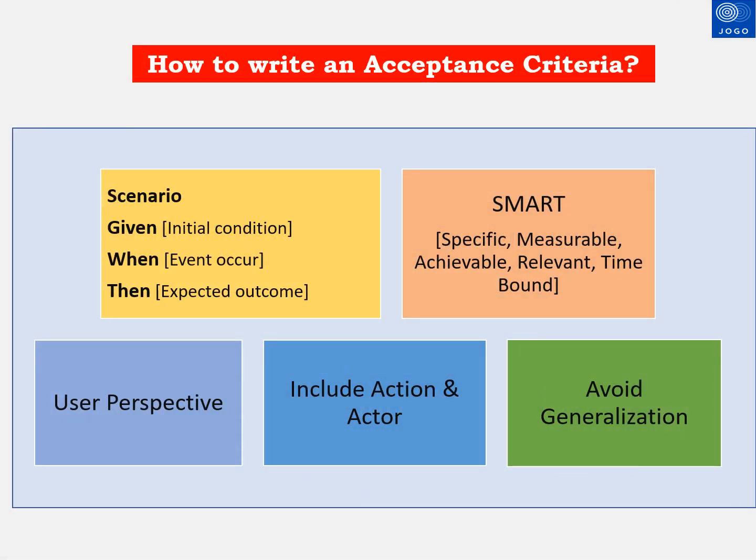Now let us see how to write acceptance criteria and what key information we should consider. User scenario along with given, when, then conditions and outcomes are needed to write good acceptance criteria. The scenario covers the user type and the need for the user. 'Given' is how things will begin in the product. 'When' is the action taken by the user. 'Then' is the outcome of the action taken by the user.